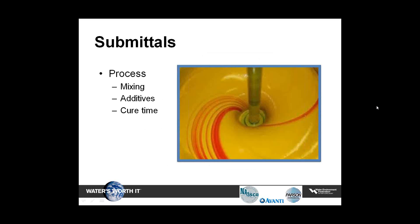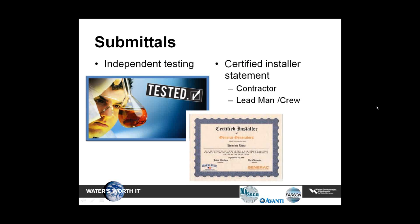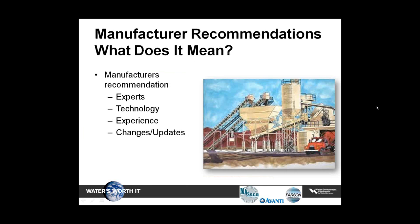The manufacturer's detailed description of the recommended material installation or application process — including mixing, additives, set time, cure time, and return to service — shall all be submitted. Also included: the manufacturer's detailed description of all required field testing processes and procedures, and copies of independent testing performed on the rehabilitation component indicating that the product meets the manufacturer's design requirements. Manufacturers are the experts of their technology — they are the ones keeping up to date with advancements in raw materials, and their recommendations should be strictly adhered to.